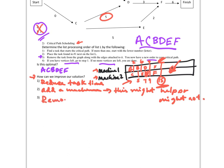And then what else might we do? Well, we might want to try to remove prerequisites. Maybe somewhere in your manufacturing or whatever you're doing, you could take out that B is dependent on A. Maybe you can do that. So these are possibilities, but obviously you might not be able to reduce task time. You might not be able to remove prerequisites. You might not be able to afford a new machine and add a machine. But these are things that you think about to make your system more efficient. And if there is something that's really bogging us down, making something really long and downtime on the other machine, then we need to fix that and say, well, okay, maybe I can remove a prerequisite. But a lot of times you have prerequisites because you've got to assemble this before you assemble that, and so on.